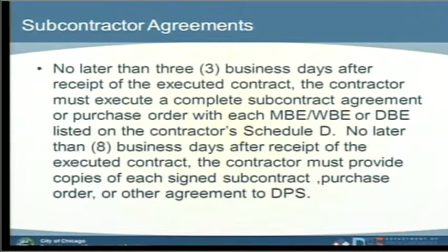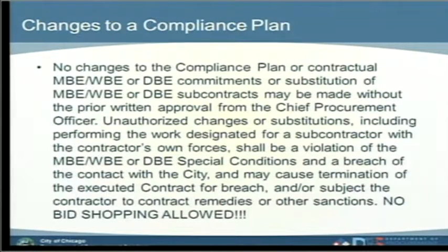No later than 8 business days after the receipt of the executed contract, the contractor must provide to the Department of Procurement Services a copy of those subcontractor agreements, purchase orders, or agreements. Changes to a compliance plan. No changes to a compliance plan or contractual minority, women, or disadvantaged business enterprise commitment, or substitution of the same, may be made without the prior written approval from the Chief Procurement Officer.